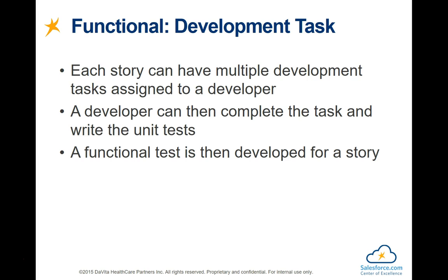Now the development team will look at those and validate the requirements and then break those functional user stories into development tasks. So once they identify those development tasks, they know that if those development tasks are performed, then it will cover one of the user stories, and if multiple user stories are covered, then it will cover one epic. And when multiple epics are covered, then it will be able to achieve an objective which is aligned to an issue.